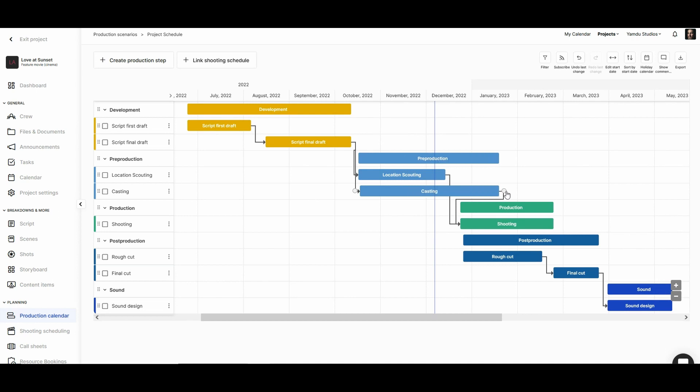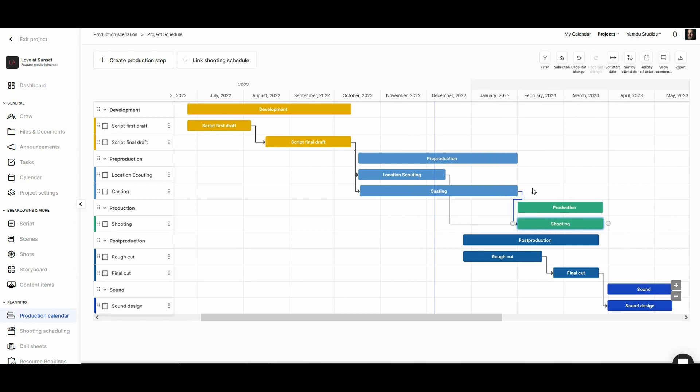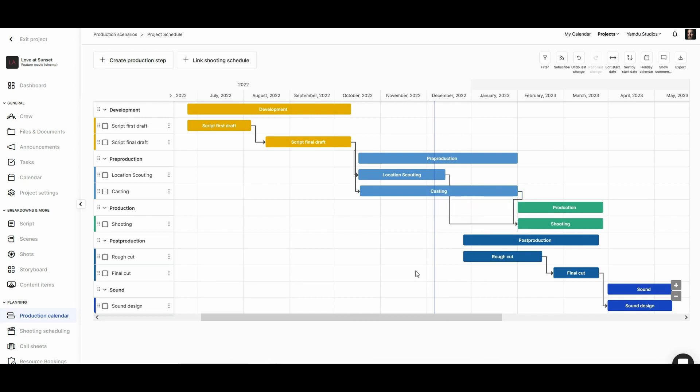If we change the length of a step and that step has a dependency with another, in this case casting will need to be completed before shooting can begin, then the following steps will also move.